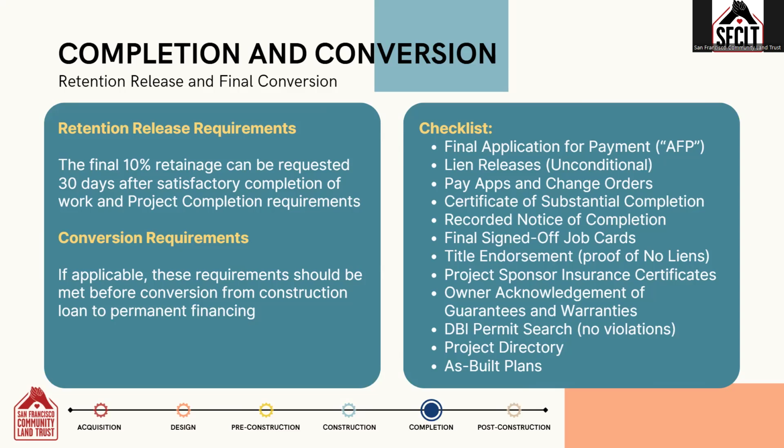Regardless of the size and scope of a project, and whether there's a lender involved or not, it's a best practice to gather these documents for every construction project completed. The construction manager should share these documents with the project sponsor to memorialize the project for future reference. In addition to the listed documents, the construction manager should include photos from before, during, and after the project, meeting notes, and documentation around critical decisions.